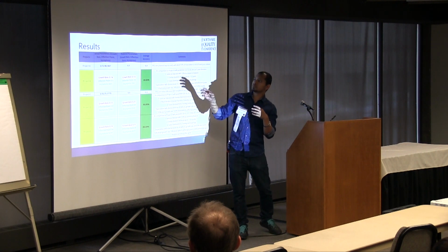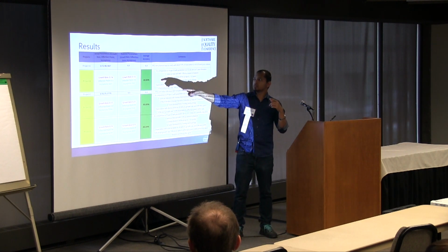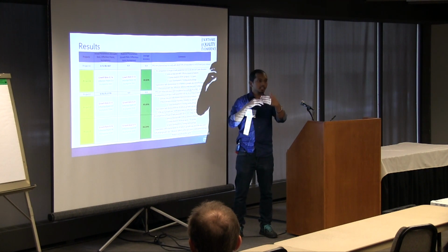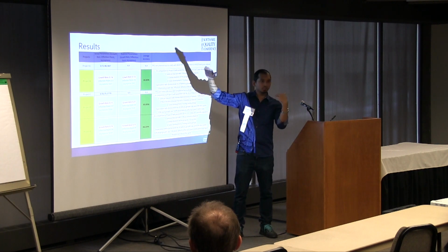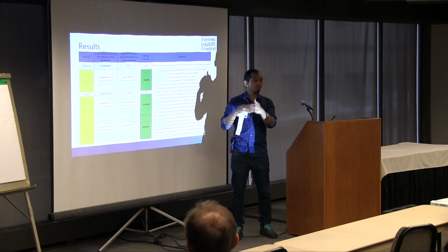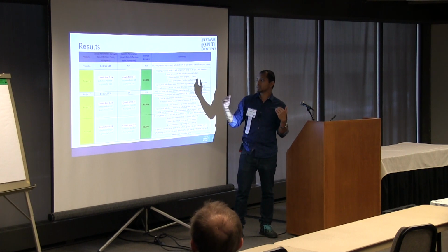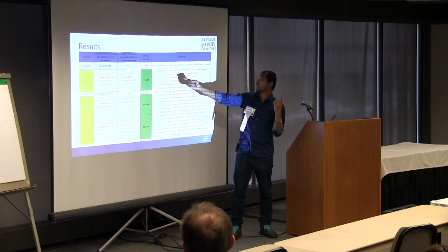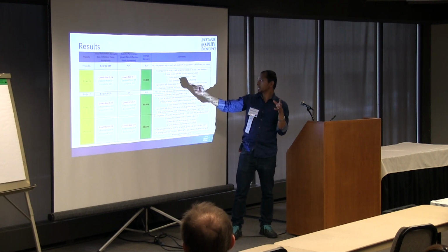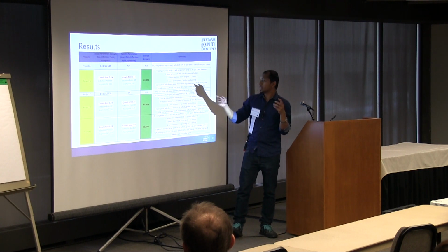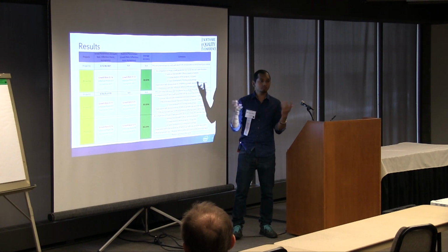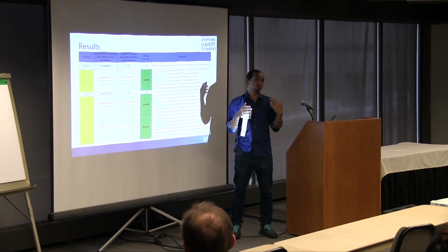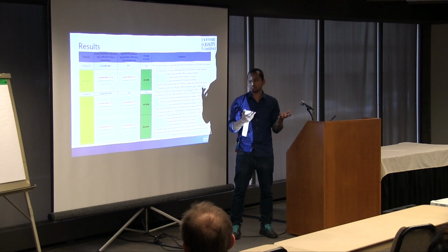In this case, the second column is the actual parameters, and the third column is what we predicted. We are taking something as a reference, which is the grayed out area. Project A was taken as a reference when predicting for project B. We said that project A and B had similar architecture, similar timelines, around 1 year as well, and they used the same development and testing methodology, and most of the people were working on that. So the expectation was that we would observe a lesser number of defects, because most of them had been resolved in the previous iteration.